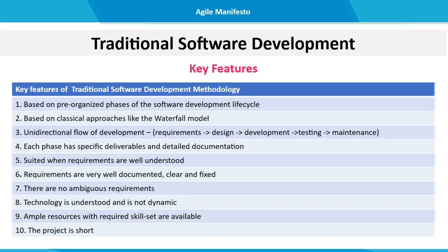This approach is suited when requirements are well understood, when the requirements are very well documented, clear and fixed. There are no ambiguous requirements. Technology is understood and is not dynamic. Ample resources with the required skill set are available. This approach is suitable when the project is short.